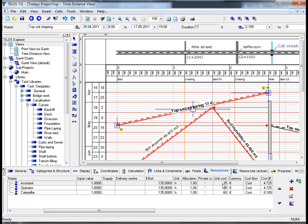By changing the input value for example to 4 as opposed to 1 and hitting return, please look at the column cost on your far right hand side and you will see that by entering the input value 4 my costs have quadrupled to 18,900 euros.